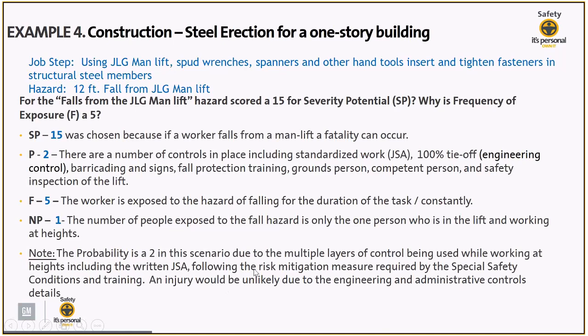administrative controls. So it's really important that you, as the reviewer of these scores, understand when a worker or a seller can use the number 2 and when they cannot use the number 2. So what you're truly looking for is the multiple controls that they have in place. And if you don't understand, then ask the contractor or seller. Ask them, hey, how did you come up with this number? Why do you have this number as a 2? You tell me what your multiple controls are that are in place. Make sure you're comfortable accepting the score. Don't simply accept what they hand to you.